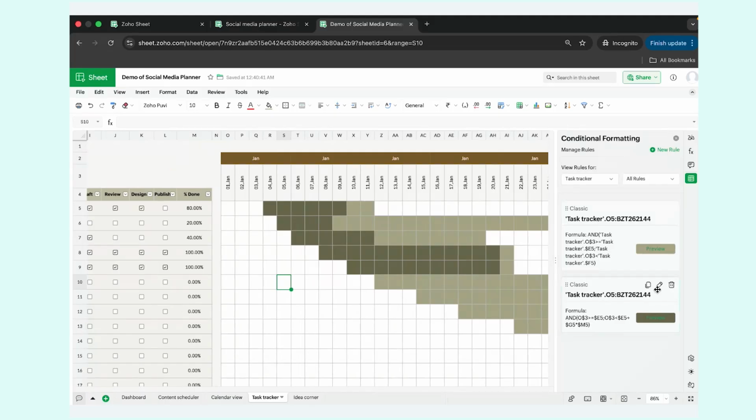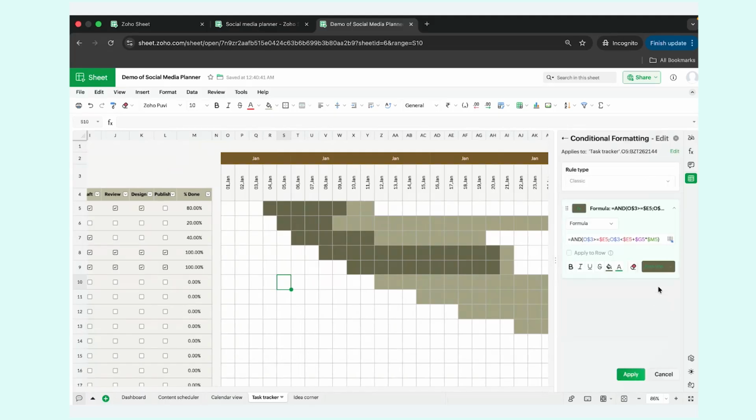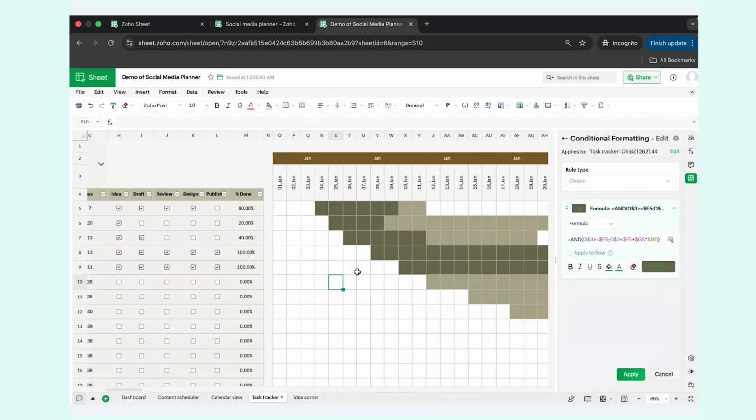And the next one that I'm going to give is highlighting only the progress that is done. So we do know what is the percentage done, but we do not know what is the percentage done in terms of a date. So if there are 10 days and 10% of your work is done, we need to know what is that 10% of work in days. So if it is 1 day for 10%, how many is it for 40% of 10 days? What is 40% of just 10 days? You're going to find that and then highlight just those cells.